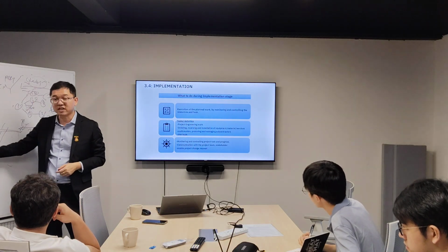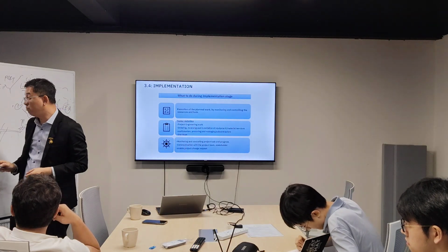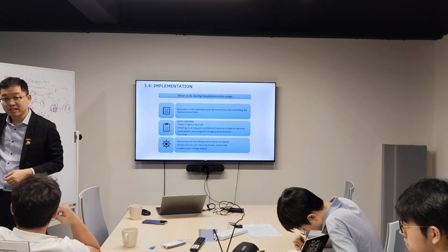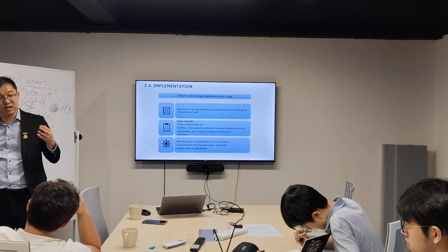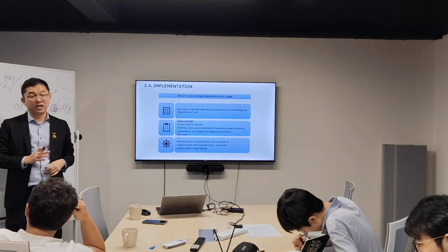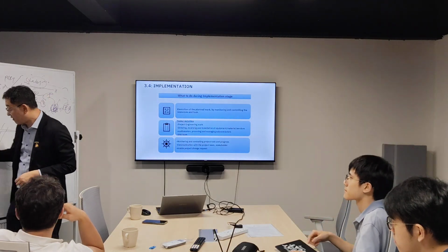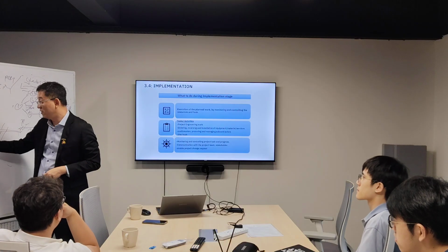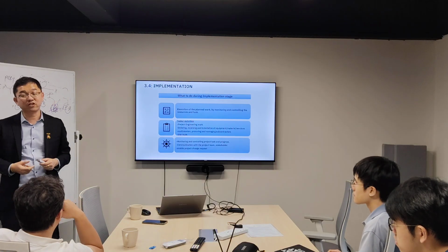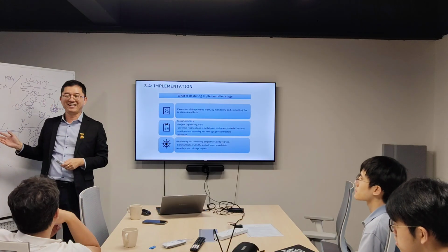But before we build this, we need to excavate first. So how do you excavate? Do you want to excavate the whole thing, then only build this, or excavate part by part within 4 teams? It depends on the schedule that you planned earlier, then you only implement it. Of course, the whole idea is we don't excavate the whole thing and only then build this, because you know what? When you excavate this, let's say it rains, this whole place is ponding, then you need to spend man hours to pump out the water again, and you are wasting your time. So when we have good planning, then we will not face this, right?